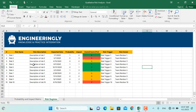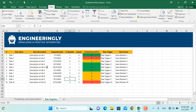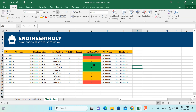As you can see here in the risk register, we have ten risks. Some of them are shown in red, some in yellow, and some in green. The red ones are high priority risks and should be put at the top of the list. If you want a prioritized list, the high priority risks should be at the beginning while the low priority risks shown in green should be placed below, because they will do less damage to the project if they happen.